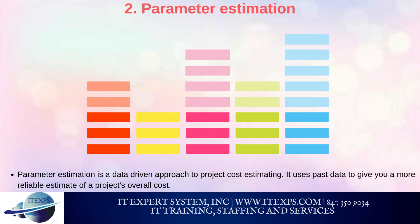Resource scheduling software is a great way to calculate task costs reliably and efficiently. Set the billable hourly rate for each of your team members so you can quickly see the cost of assigned tasks against your project's total budget. It also removes the risk of any human error from manually entering data into a spreadsheet.